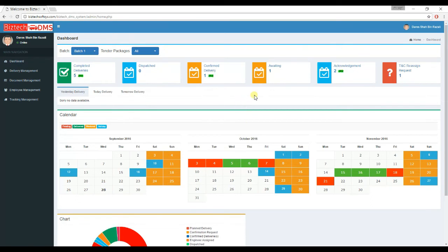After the engineer accepted, after the supplier starts the dispatch, he needs to complete the DO, submit the delivery order document, and after that he needs to accept the TNC work and upload the TNC checklist, and he needs to complete the delivery. After he completes uploading the document, the state coordinator will be able to see that as a completed delivery and the process is completed.